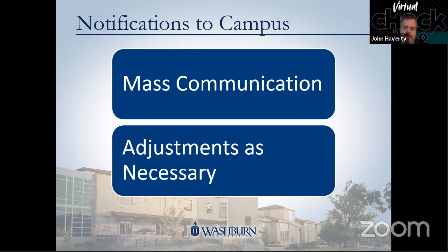So this is an ongoing, constant reevaluation of what we can do better and how processes can be tweaked. It's what I try to encourage the team to do, and they were certainly doing that. If they saw something that wasn't working, we'd talk about it, modify it and tweak it. So one thing that we did, probably in January or February, trying to catch up because we were behind schedule, was to start sending out mass communication to everyone in that department, say admissions, that was going to get a computer. They would all get an email saying, we're going to be here between this time and this time, and the technician will be this person. So we did mail merges, basically, and that helped a lot.